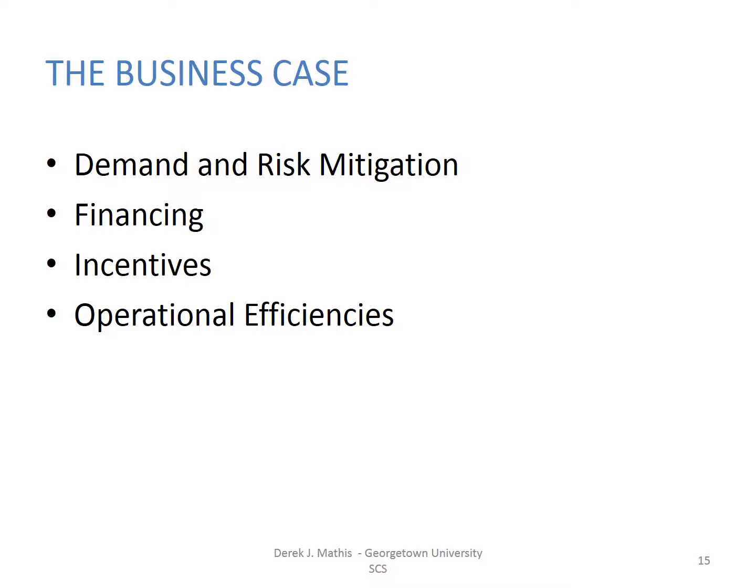It certainly helps that they had Bank of America as a tenant and co-owner, and they pre-leased 6 trading floors to them, which was 75% of the building. This is a significant reduction in risk. The fact that the building was 98% leased prior to the completion of construction tells me that Durst was successful in pre-selling their vision. Durst was likely incorporating tenant feedback into their development approach as well.